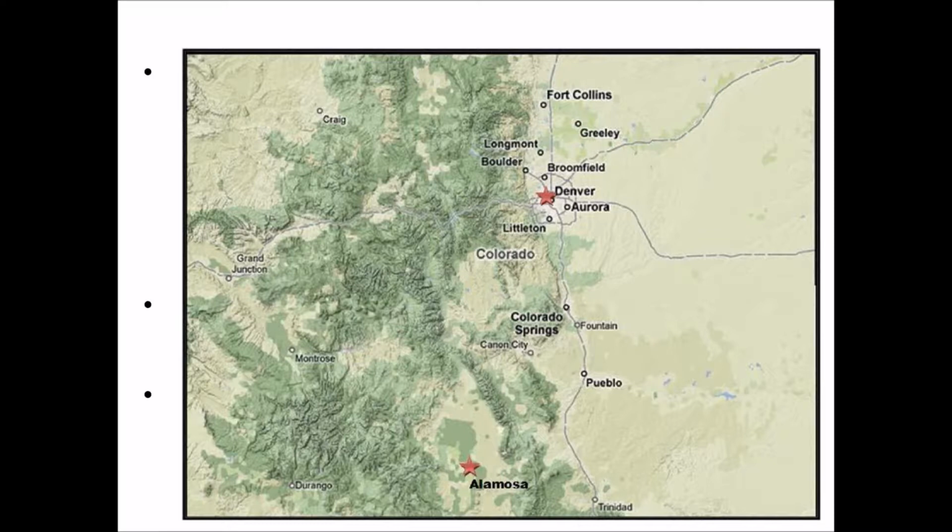They also sometimes assume that the NIMS model for communication is in play, but sometimes in the heat of the event, other communication methods are used that may not be quite as effective. Typical after-action reports often focus more on form rather than probing objective analyses. The root cause analysis, which we'll be speaking about today, is optional and often not done, and even lessons learned are sometimes not pulled out in a formal way. The improvement plans are often missing altogether or not the basis of a very good analysis.